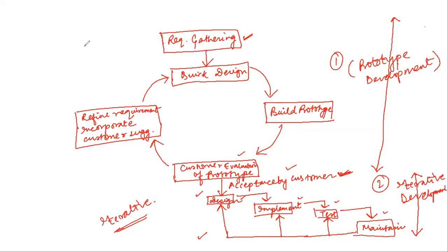After that we may give it to the customer in order to take feedback. So already a lot more cost is associated. So even if some additional cost is there for building the prototype, it is seen that overall development cost is lower. And this is the reason why we still follow this prototype making procedure. That is, for critical types of solutions, we require this type of procedure in order to build our actual software.